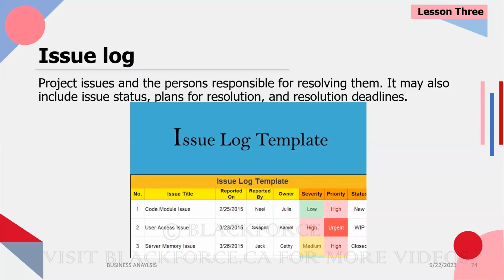Okay, but if a user story should take one day, and the developer is gold plating, it's one of two things. They're not going to finish it in a day, or they could have moved on to something else and done 2 stories in one day instead. At the time that the developer is gold plating, you will not know because they're building, right? They're building.